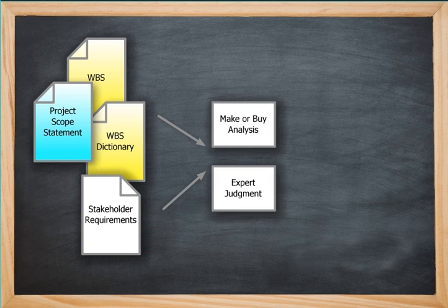There are really two tools and techniques used in this process. The first is the make versus buy analysis that we mentioned earlier. This includes analyzing tried and true criteria, including skill, capacity of the seller, cost, and risk. Those four together probably form the best criteria that you can use to decide whether to make versus buy. And one by itself, like cost, can easily lead to regretful decisions. You can simplify the whole make versus buy decision by using a very simple form of risk-reward decision matrix.